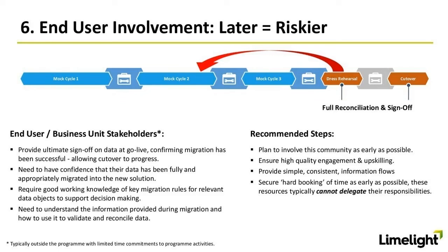So we've indicated there that perhaps mock cycle 2 would be a good window to involve them. That's typically the first full data load, including all data objects. Sometimes the first mock cycle is core master data only. We'd recommend, for obvious reasons, probably that we provide simple and consistent information flows to those people. Again, thinking about going up the mountain in stages, so that what they're seeing is consistent every time, and they can learn and become more involved in the program almost naturally.